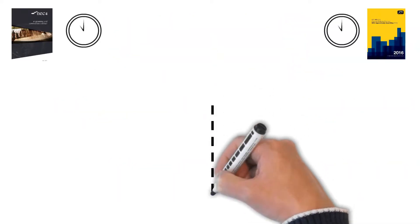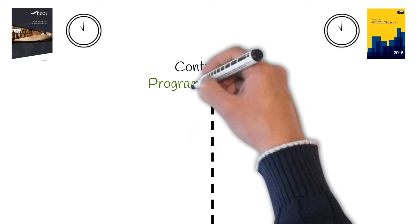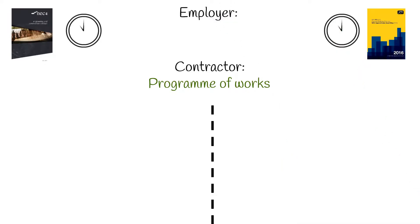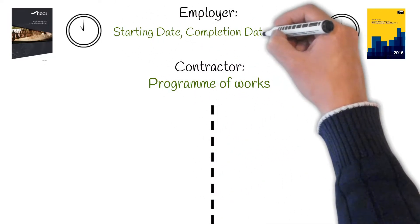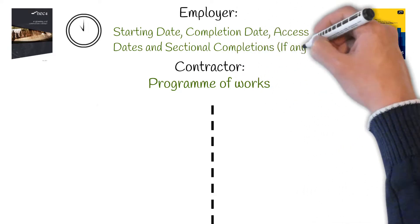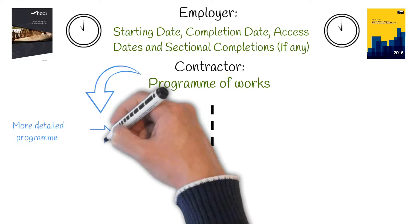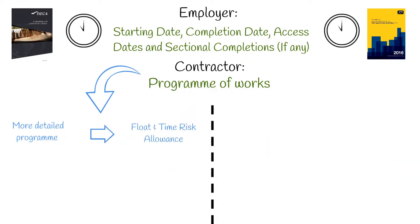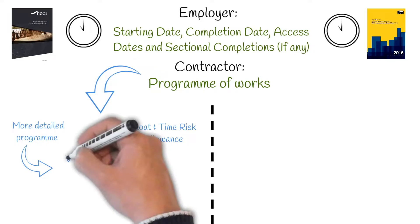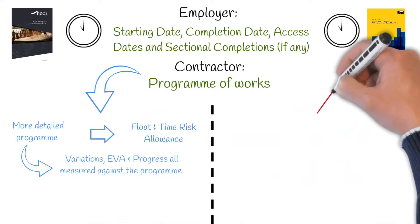Time. Both contracts require the contractor to submit a program for the works to be undertaken. Both contracts also require the employer to state a starting date, completion date, access dates and any sectional completions. However, the NEC requires a much greater level of detail, containing key concepts such as float and time risk allowance. The NEC uses the initial program as a tool for how variations, earned value management and progress of the project is assessed.